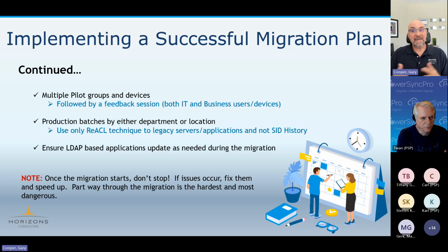Plus, if something drastically goes wrong, and by this point it shouldn't, but if it did, do I really want to take out all of my procurement department in one shot, or all of my HR, or all of my marketing? I probably don't. I probably want to take a piece of them in this location and leave the rest of them untouched for now.